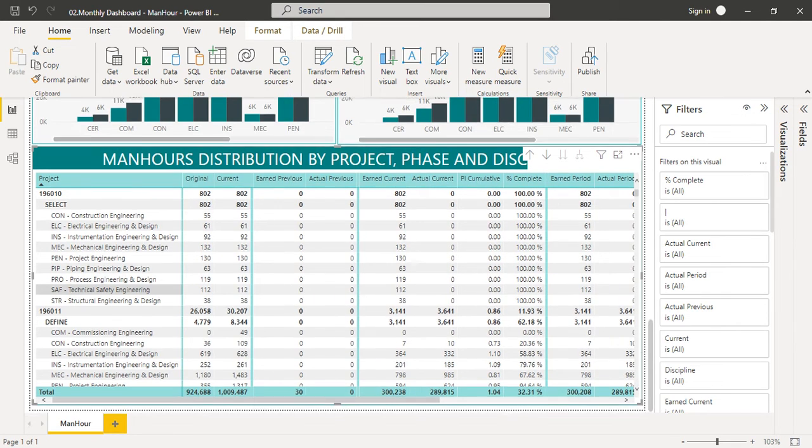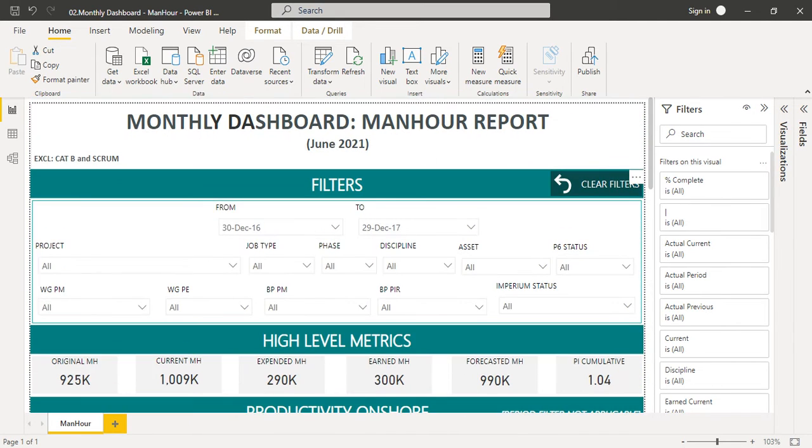This report is quite short. Not very much information is given in it, but it shows us quite good visibility on how we are doing. If PI is okay, then it means we are doing okay. If PI is lower than 1, maybe lower than 0.9, then we need to think about what's going wrong.